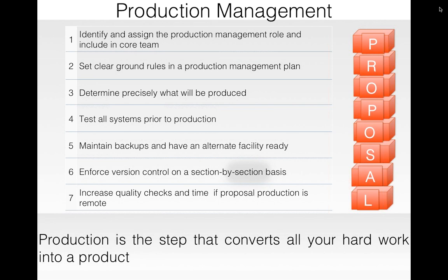Now if you do not set that the entire proposal should be printed on paper which can go into a 3-ring binder, you will end up in a mess. You will either be punching holes, or you will have to reject the entire printed set of documents and print new documents.